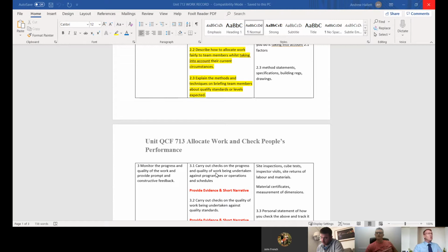Excellent, excellent. So those are communicated to them. They've probably sent them. Do you ever have to have discussions around that, Kieran? Perhaps before a contract starts, reminding them of those standards, or you might be carrying out one of your inspections. So we're 4 weeks into that 12 weekly, and you think actually the work that was done in weekends 3 to 4 isn't quite the standard we're expecting. I had one in Stafford, not that long ago. They reinstated an earthwork job and put in the assessed footpath, but it was non-compliant with the standard. Raise the TQ then. Excellent.